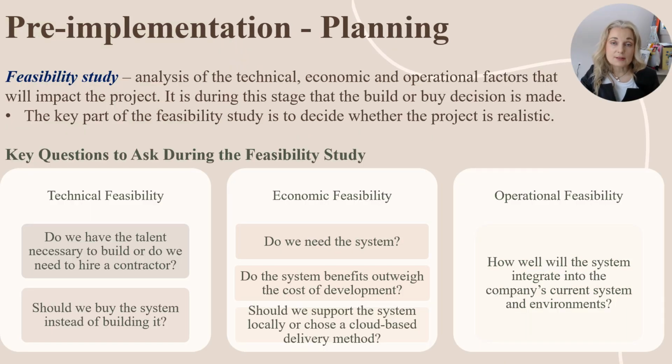As we talked about, part of planning includes the creation of a feasibility study. A feasibility study is an analysis of the technical, economic, and operational factors that will impact the project. And it is during this stage that the build or buy decision is made. The key part of the feasibility study is to decide whether the project is realistic at a given point in time. And the key questions to ask during a feasibility study, you have to look at the technical perspective.